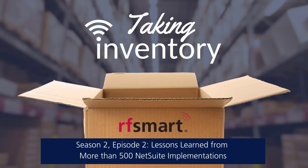And I mean, companies have a lot of data. When you think of a typical distribution company, they can have thousands of products, and they can also have thousands of products that they don't sell anymore. So you need to go through that with a fine-tooth comb to make sure that you've got the right information going in. So I think the irony behind that is most people are moving to a new solution, whether it's RF Smart or NetSuite, because their existing system has some limitations and they do workarounds, and those workarounds create bad data. So there's never really a case where somebody's on a system and they're like, our data is so good, let's go to a new system, right? So don't ever be so confident in your data that you're going to just migrate it over.